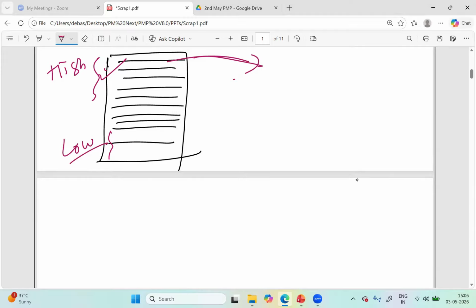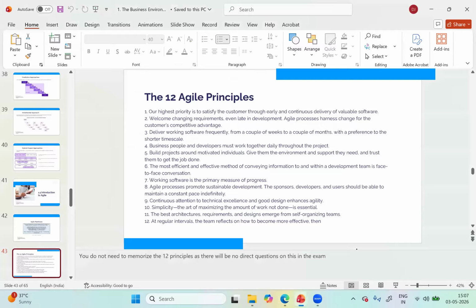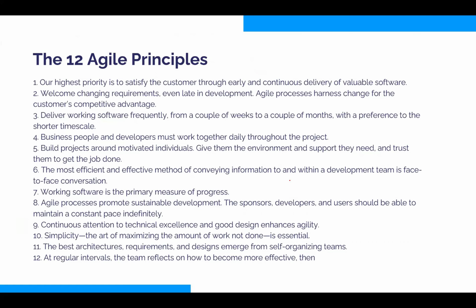If we were to leave some out, we may drop low priority ones. We keep on delivering as much as we can from this wish list. All right. And that's why what we deliver first is high priority items. So what we happen to leave out would be only low payback items, items that provide less business value. Prioritization. So principle number 10 means these two things: eliminate waste and prioritize what you do.